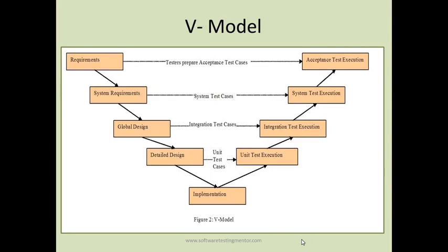The organization had already invested money in requirements gathering, in designing, in developing, and then the testers found that the requirement itself was not valid, or that there were design flaws in the software. At that point of time, the cost of capturing the correct requirement again or redesigning is way higher than if it had been detected well in advance.